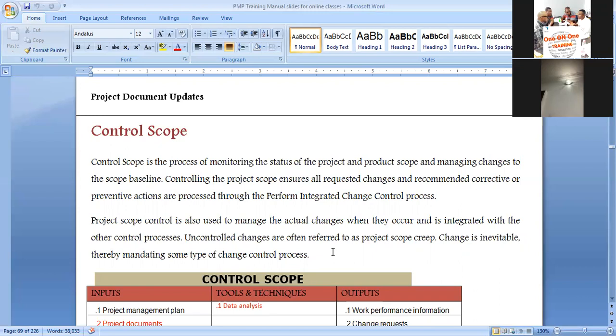Are we in line? If you are not in line, in project management, we call it scope creep. When the scope is creeping, it's called scope creep, which means unwanted changes are beginning to enter our project. Undesired changes are happening, changing our project scope. In a place where we wanted to use 3 bags of cement, all of a sudden it is 4. And now the mason is even wasting cement. Can you see that? That is going to affect the budget, and also it will affect the schedule, the time required.